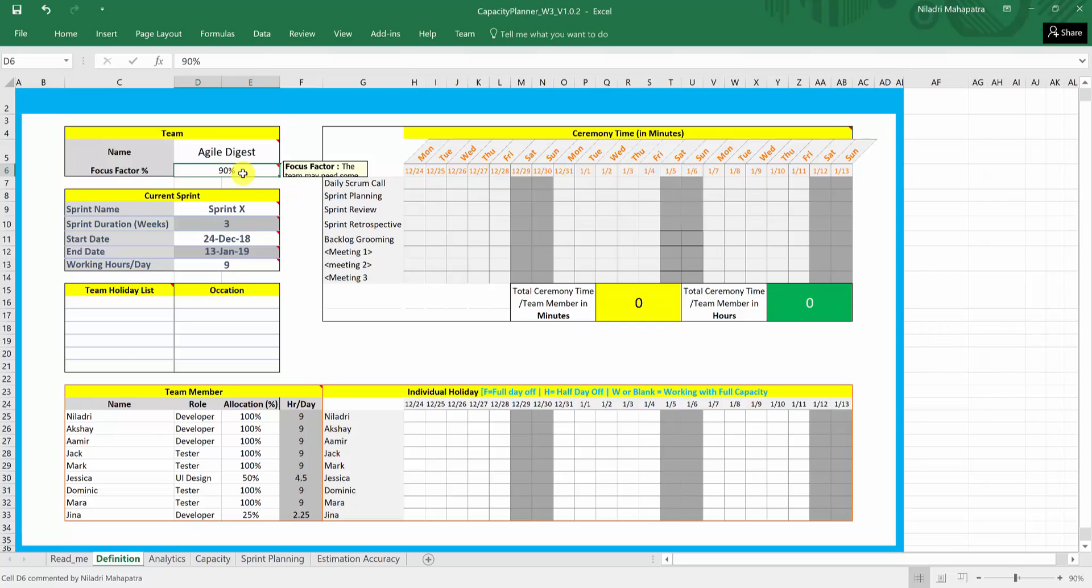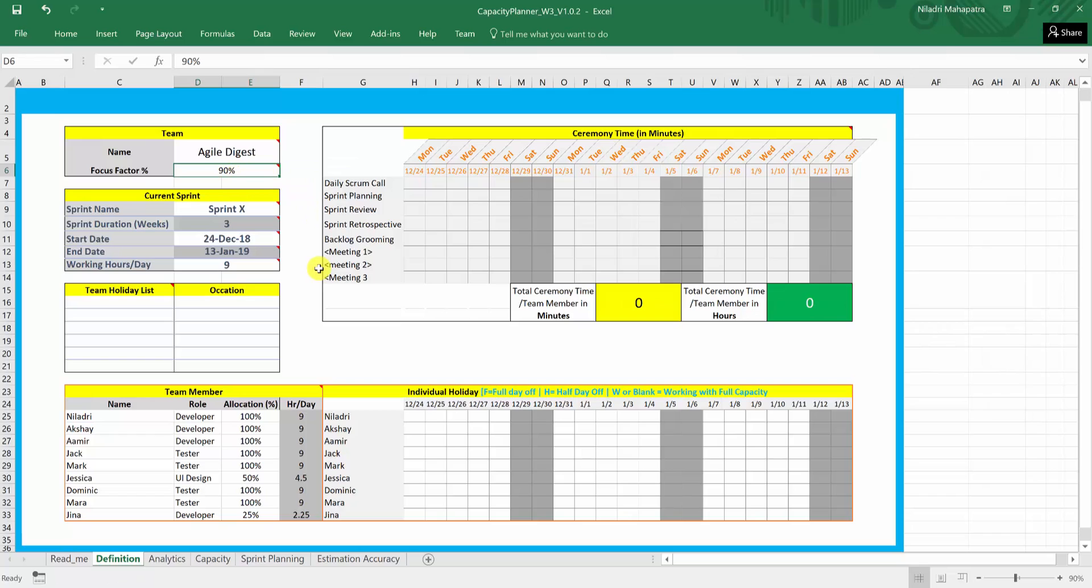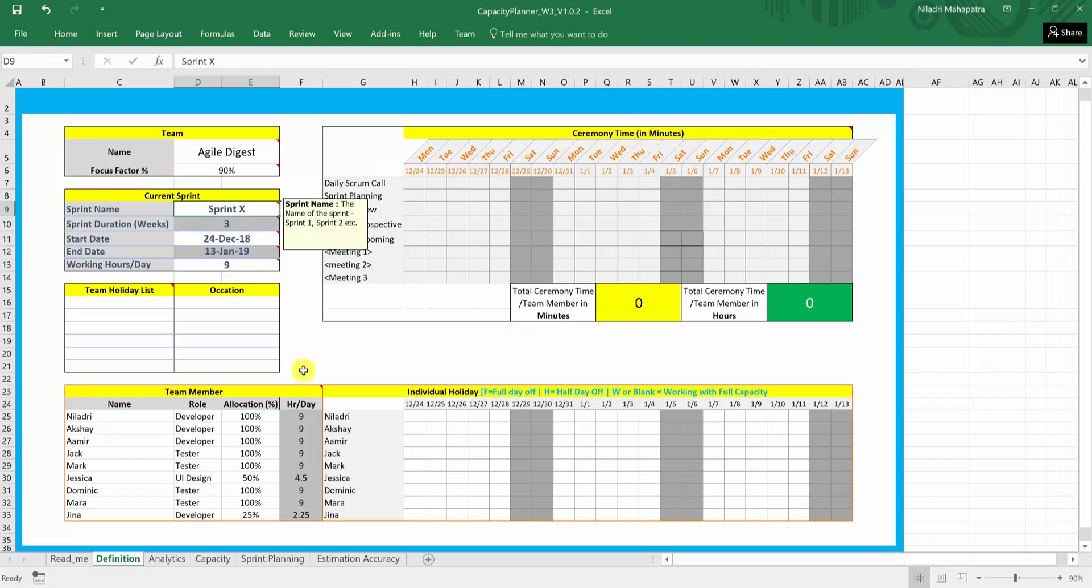The focus factor is how much percentage you are focusing for your capacity. Most of the team does that 85 percent or 90 percent, but few teams, they still think they have covered most of all the ceremonies and times they will be putting in and they are giving a 100 percent of capacity. This focus factor actually says even if you are saying you are working on this much of capacity, but out of that capacity, you may not be able to fully devote to only that sprint development or sprint activity. You may be doing something out of the sprint activities as well. So based on that, you can define how many percentage you will be working on this sprint development. Now, the sprint name. So this will be each sprint will be having a different name. For an example, sprint 1, sprint 2, sprint 3, sprint 4 and so on.